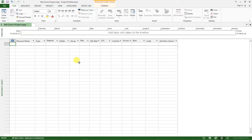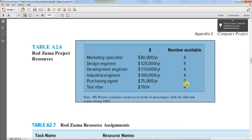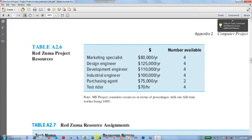Resources are what is required or consumed for the project to be implemented. For example, if you are looking at a construction project, you will require resources such as workers — maybe masons or laborers such as site supervisors. You also require materials such as cement, sand, ballast, roofing nails, and the rest. For us here, I already have a predefined resource list that I want us to put into MS Project, and I will start by typing them so you can follow along.